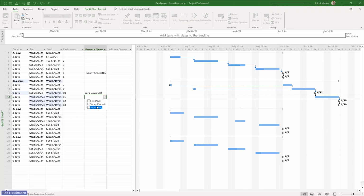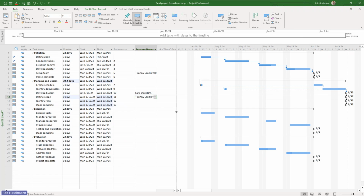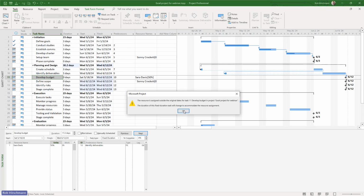In traditional Microsoft Project scheduling, based on their availability, it'll change or move potential dates because someone is more or less available. But what I can also do is percent allocations. And this is one of the differentiators between using the desktop client and the new Planner Premium. If I wanted to come in here and say for Sarah, I want to assign her at 50% of her time for this activity, and maybe we'll do a duration of 10 days, you can be very, very specific about this.